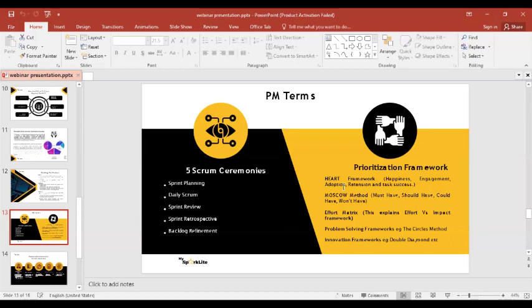Then I said sprint review is when you ship a deliverable, and the stakeholders review the deliverables to give you updates and areas to make adjustments. Then you go back to the Scrum team so that they can look into the review, the updates, areas of adjustment and bug fixes, plus the stakeholders will also bring new recommendations that they feel you should make adjustments to. You understand?